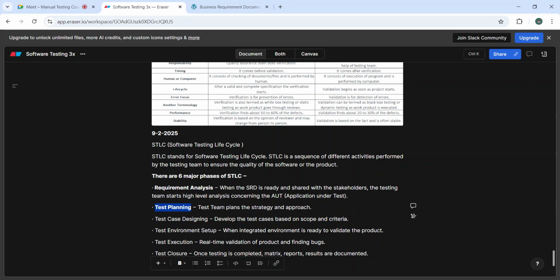For example, let us say I have given you to test the functionality of WhatsApp video background images. The new functionality that has come in WhatsApp, in video we can also put a background, like Zoom and Teams and all. Okay, so now I have given you this to test. Today you are working in the same project, you get an estimate that this is the time period required to test that functionality, so you will give me some time period, right? According to that, we will be considering design time, understanding requirement time as well, test case design time, then when the application comes, the test execution time. So this part will get considered, right?